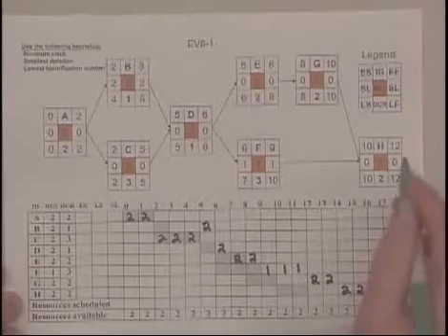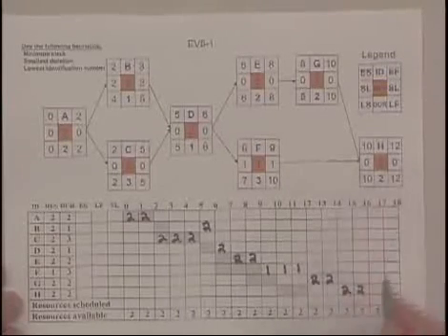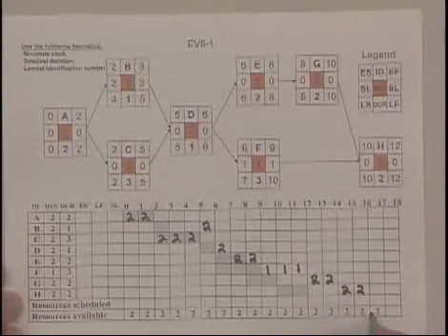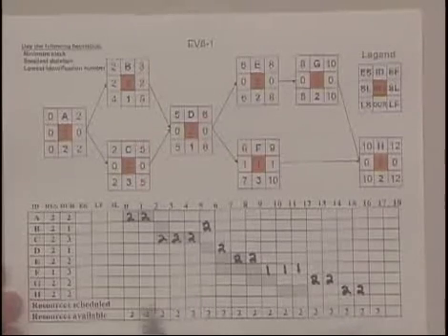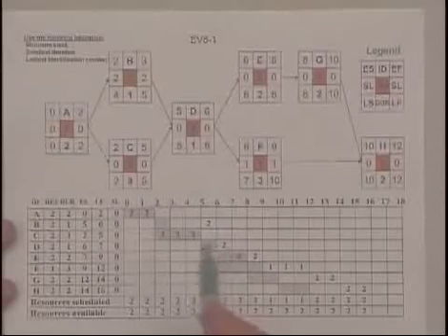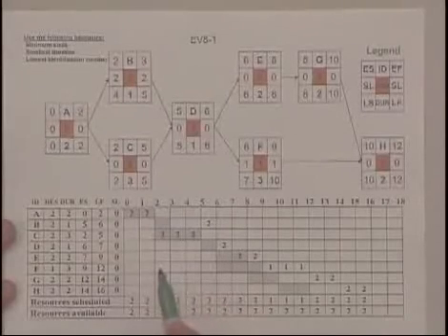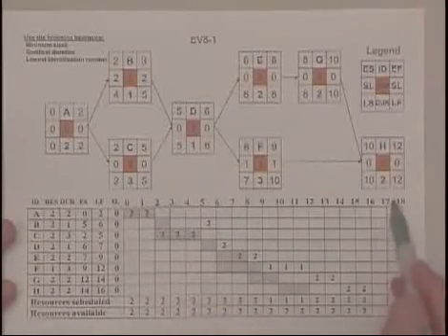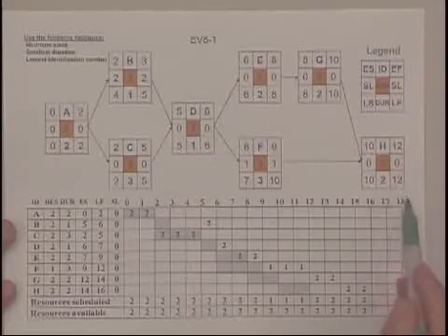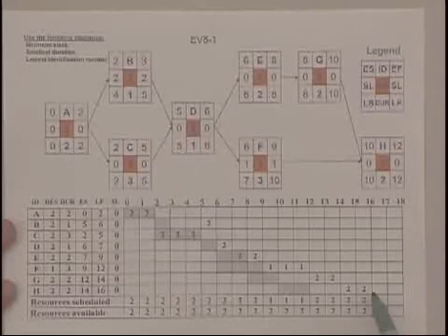And we see now that the project has been extended from 12 weeks to 16 weeks. And this often occurs when you have a resource-constrained schedule. The duration or length of the project is extended. So here we have our first resource-constrained project. And as I pointed out, it has been extended from 12 to 16 weeks.